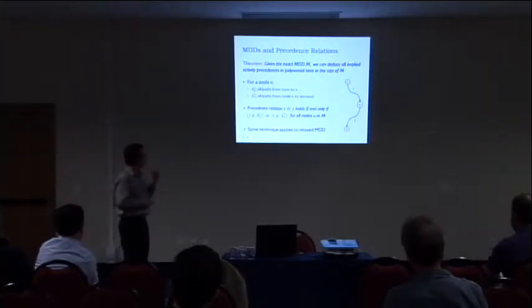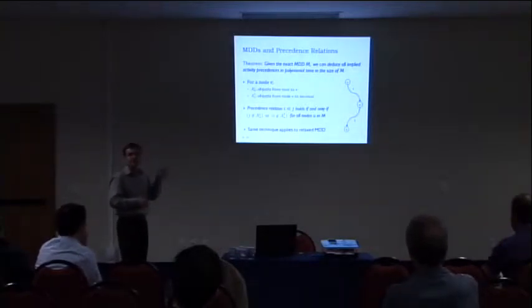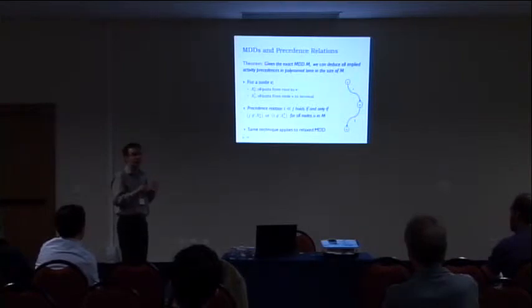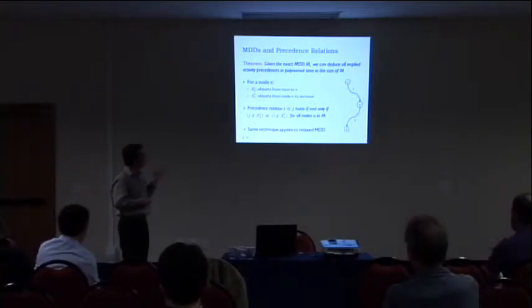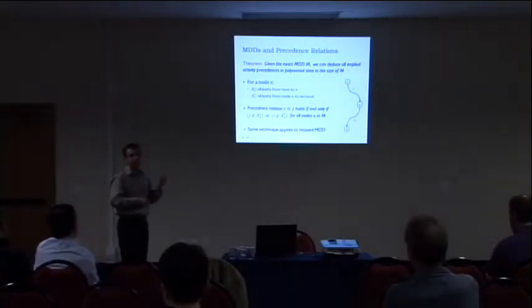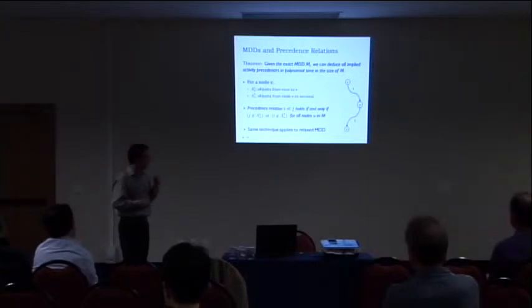And what is interesting is that this same theorem also works for relaxed MDDs. The difference is that for relaxed MDDs, we also have infeasible sequences, so you're not going to be able to deduce all the precedence relations. But all the precedence relations that we deduce using this idea from relaxed MDDs are valid. You can prove that. Okay?